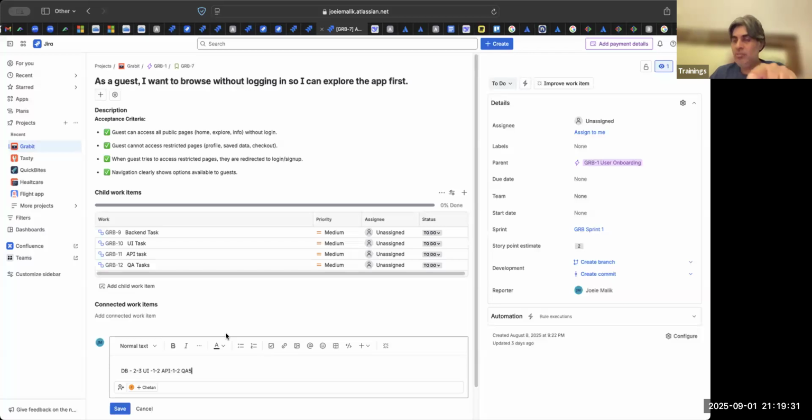If you have to do very deep micromanagement, then you said 5 hours, then you log the thing. Then in the retrospectives, I can come up and say, oh, you said estimated is 5 hours, but the actual is 6.5 hours. You understood? You can do the actuals versus planned also. And a lot of these toxic organizations are doing it. I don't want to comment on it, but I have to tell you, if you are asked, yes, that is also a possibility.